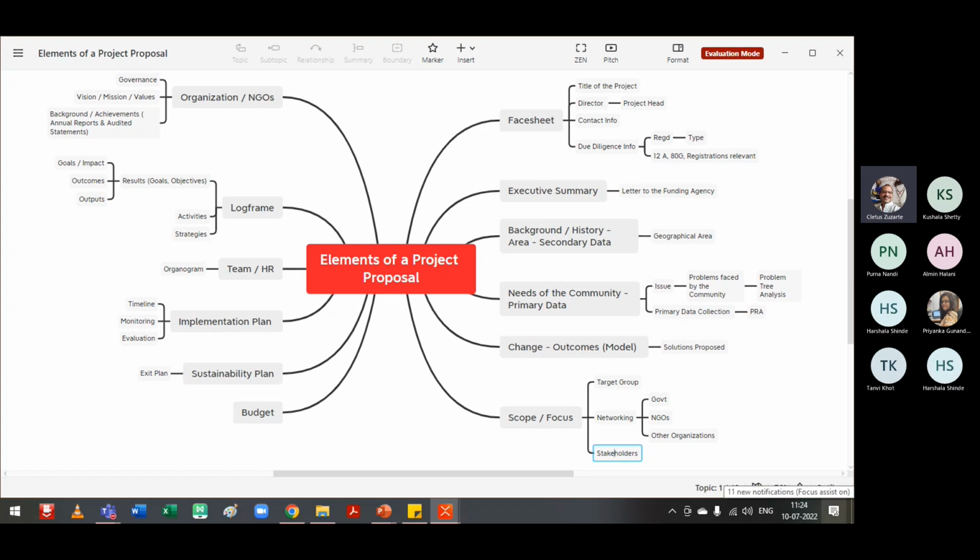But even this is a little fast in terms of outcomes and impact, especially in the social work field. Now, in a project proposal, you will definitely put in the budget for year 1, year 2, year 3. You will put the year 1 budget first, and then an incremental increase in the second year and in the third year. Usually there are thumb rules for that, like 10% incremental increase.